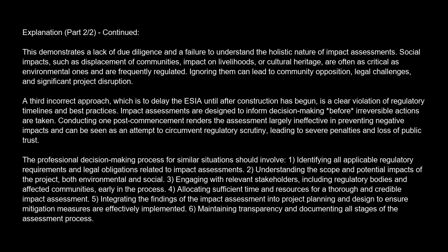A third incorrect approach, which is to delay the EIA until after construction has begun, is a clear violation of regulatory timelines and best practices. Impact assessments are designed to inform decision-making before irreversible actions are taken. Conducting one post-commencement renders the assessment largely ineffective in preventing negative impacts and can be seen as an attempt to circumvent regulatory scrutiny, leading to severe penalties and loss of public trust.